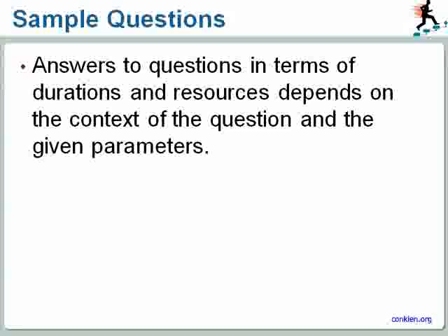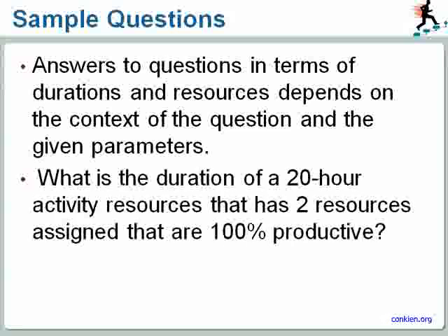For example, what is the duration of a 20-hour activity that has 2 resources assigned which are both 100% productive? Now, this is a simple calculation that you can do in your head. 20 hours, 2 people, both work 100%, 20 divided by 2 is obviously 10 hours.